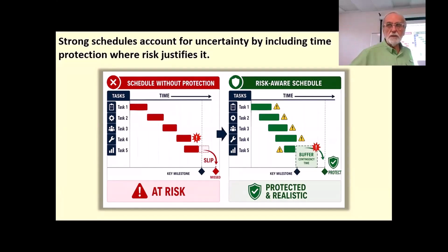We want to look at the impact of potential risk. If something that we planned for, the time estimate for that has passed, then we probably don't want to keep a contingency for it. We want to take that contingency off the table, but maybe we reanalyze it and it's changed, but it's still a problem. We want to do that.